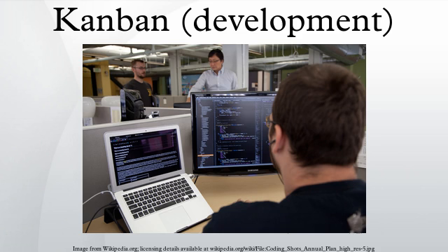Kanban is a method for managing knowledge work with an emphasis on just-in-time delivery while not overloading the team members. In this approach, the process, from definition of a task to its delivery to the customer, is displayed for participants to see, and team members pull work from a queue. Kanban in the context of software development can mean a visual process management system that tells what to produce, when to produce it, and how much to produce, inspired by the Toyota production system and lean manufacturing.